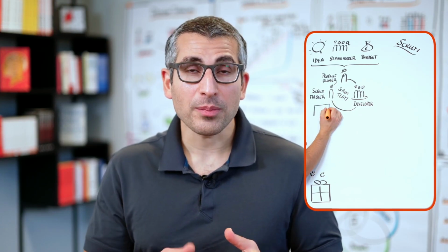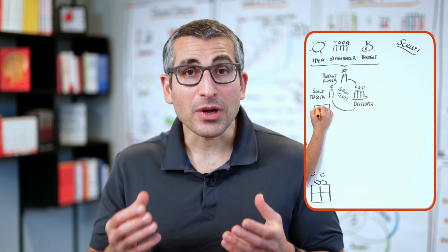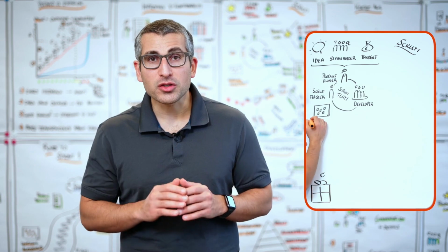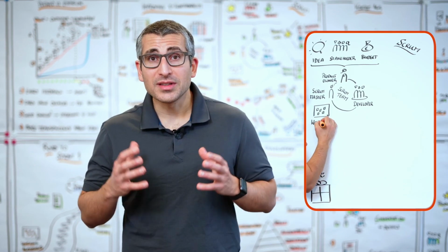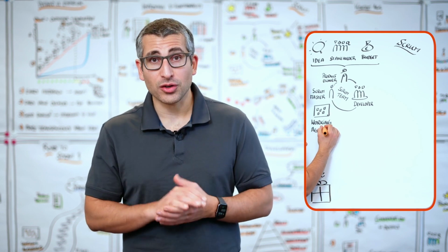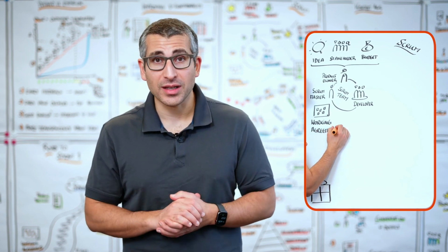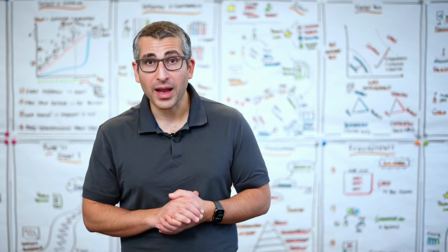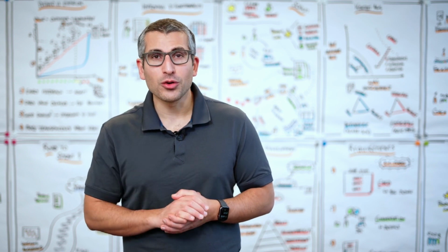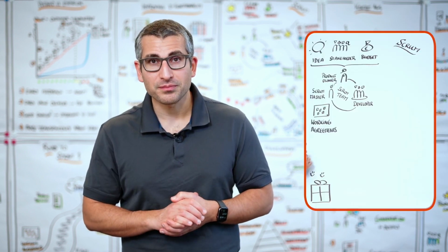I usually draw them right next to our Scrum Master, because our Scrum Master is responsible that those working agreements exist. Any good Scrum Master knows that if a team doesn't have a shared understanding on how they're going to work together, when events are going to happen, what they value as a team, that team is doomed to fail. So a Scrum Master creates some kind of a workshop where the group of people collaboratively decide what they want their working agreements to be. They can use various templates for that, and we included one in your documentation.